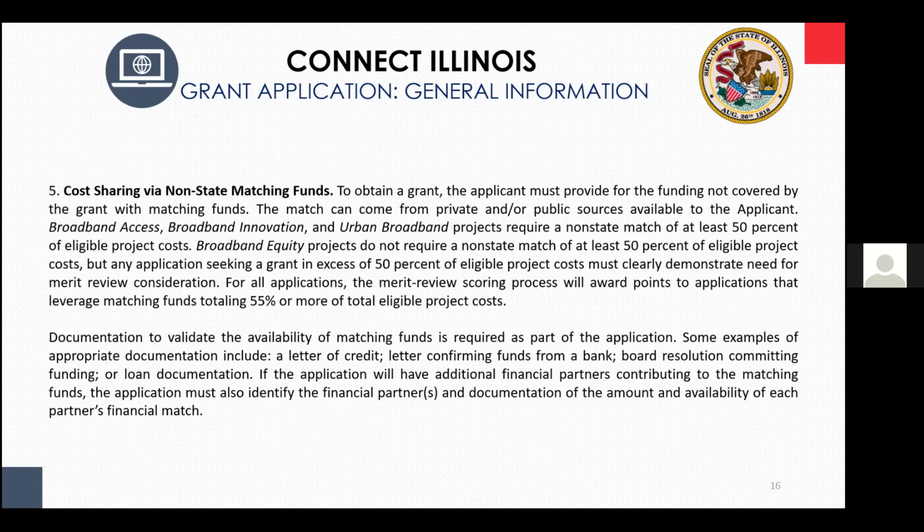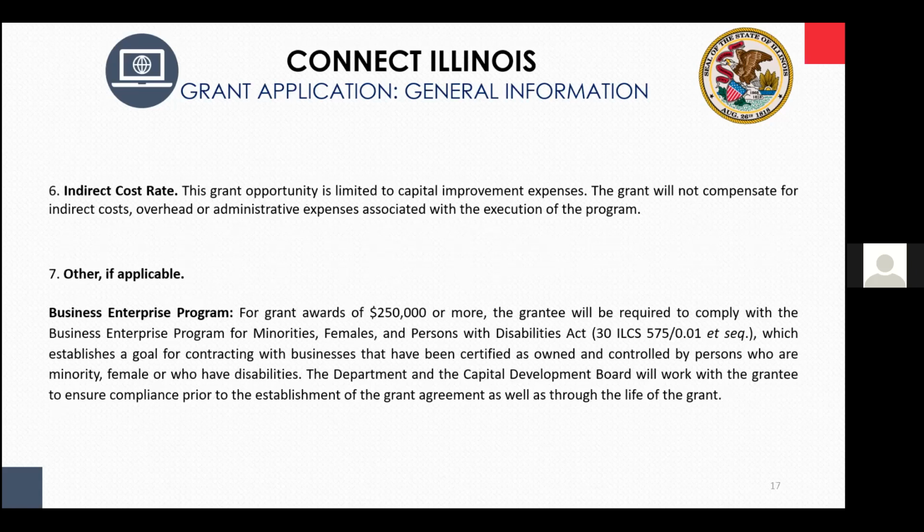And if you get into the materials, you'll have a pretty clear path as to how to designate your project accordingly. Again, future slides, we'll get into the details a little bit here in a moment. And again, because this is bond-backed, indirect costs are not covered, not eligible for expense. We've been asked that. That's included in our FAQ document. So just wanted to mention that.